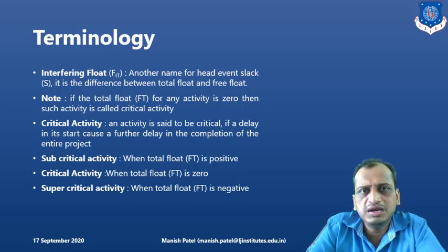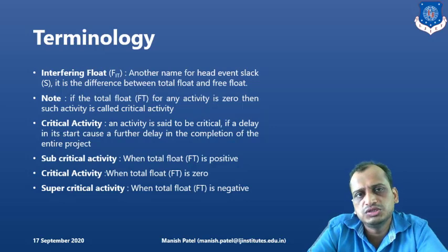Now, what is the subcritical activity? Subcritical activity is the activity where the total float is positive. Supercritical activities are the activities where the float is negative. And critical activities are the activities where the total float is zero.